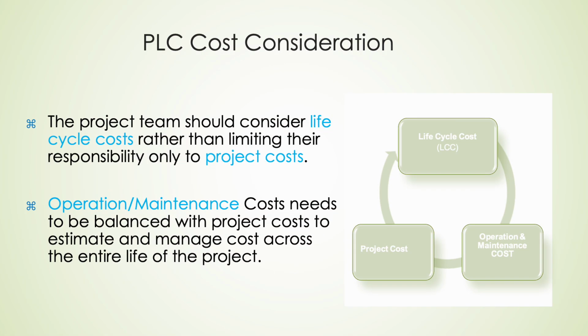When we talk about costs in a project, it's critical to think in terms of the entire life cycle. Life cycle cost, or LCC, includes not just the initial project costs, like construction, design, and development, but also the ongoing operation and maintenance costs that accumulate over time. Focusing only on upfront costs gives an incomplete picture of the true financial commitment.